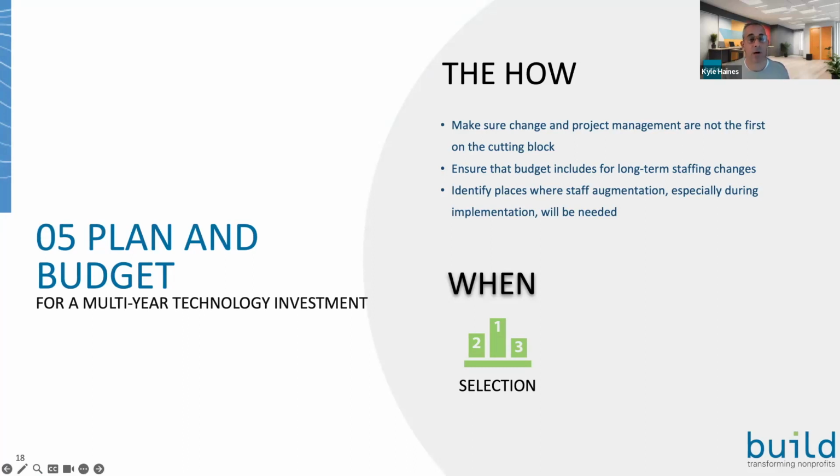Many times, through intensive periods of projects like this, it might be anywhere from a half to three-quarters to a full-time FTE with respect to the amount of time that's going to be required of them to participate in an enterprise-wide technology project. The other thing that gets missed is the need for change management.